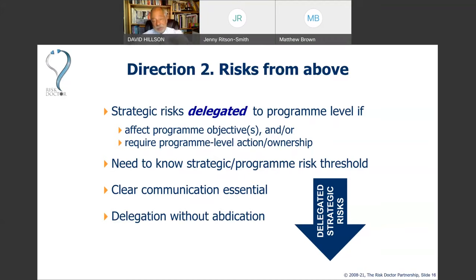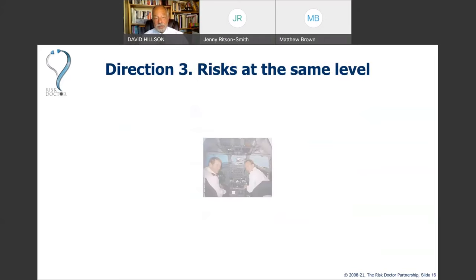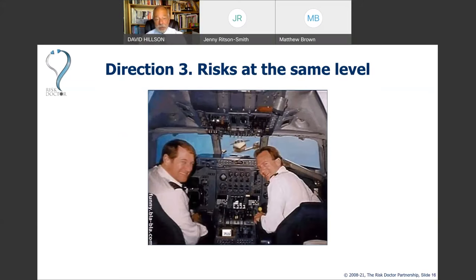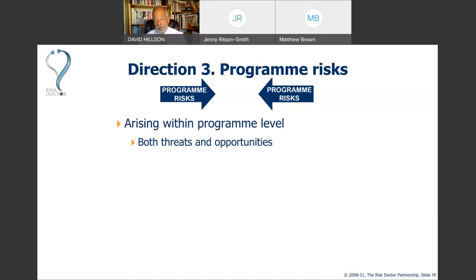Programme managers can be stuck in the middle — an uncomfortable place where risks are coming up from below and dropping on them from above, whilst they're managing the programme. It's really important to have clear communication and an understanding that we're accepting risk to manage on behalf of those above or below us in the hierarchy. There are also risks that could affect us directly at the programme level — not escalated or aggregated from below, and not delegated from above, but threats and opportunities arising within the programme itself.